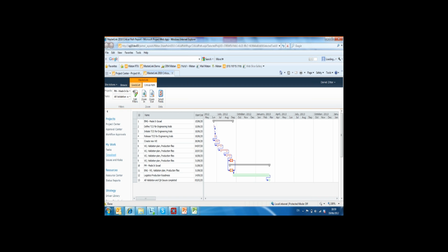All that the project side, the project coordinator does is raise flags telling you who's on the critical path, who do I need to focus on, which one of the functional managers moved something or has dropped the ball on the critical path, and you need to do something in order for the project to get back on track. So timesheets are completely in the hands of the functional manager in this scenario.